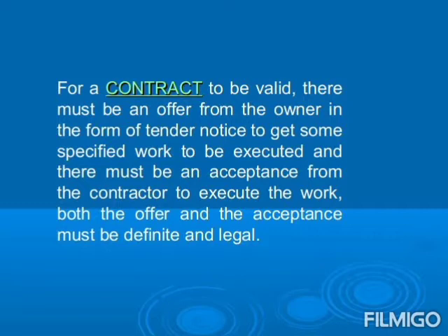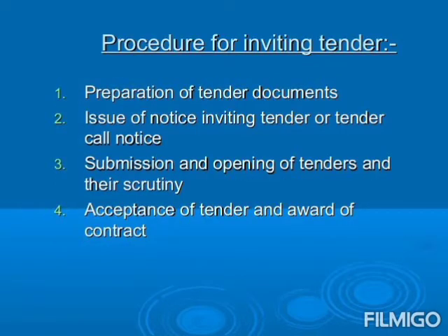Procedure for inviting a tender. First point, preparation of tender documents. Second point, issue of notice inviting tender or tender call notice. Third point, submission and opening of tenders and their scrutiny. Fourth point, acceptance of tender and award of contract.